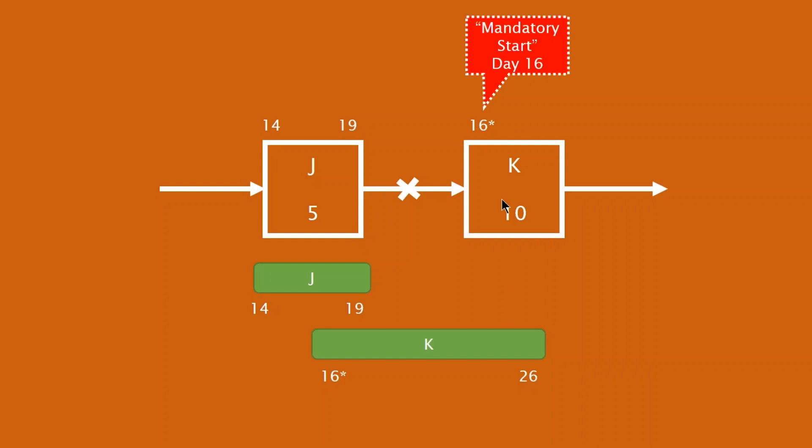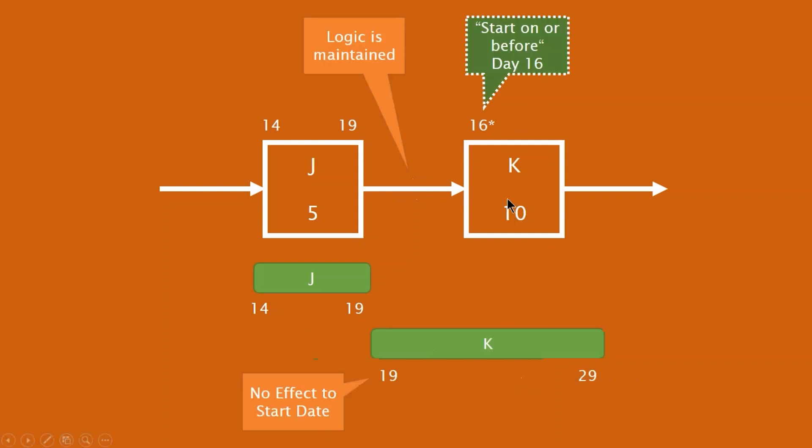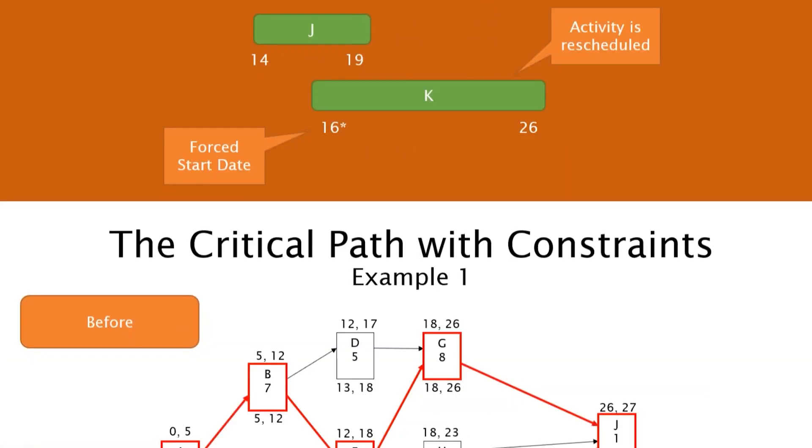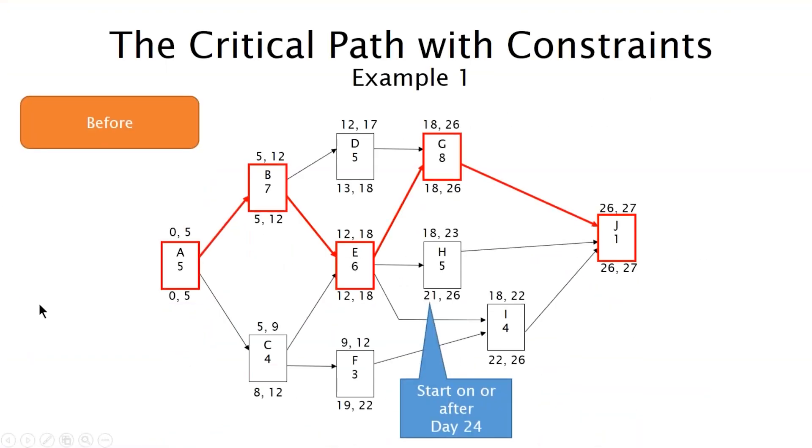So we advocate not using mandatory hard constraints at all. Soft constraints, we advocate for using them very gingerly. Let's go back to slides here. So we advocate using them sparingly as well. There are people who can mess with schedules and make them, let's say, less than honest schedulers out there who are trying to put themselves in positions above their contracts and whatnot, who can use constraints to sort of benefit them. So there have been, there's a lot of debate about whether we should use constraints at all. And we advocate basically here at Plan Academy, use them sparingly. I'm not saying don't use them at all, but I'm just saying use them sparingly.